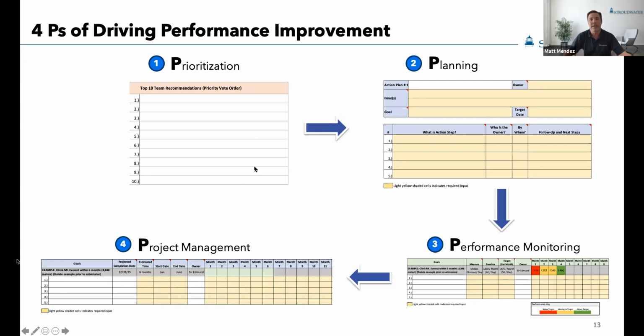And so they need to support and be aligned well with the organization's overarching desire and direction. The second phase is around planning. So we take each of your priorities and we break them down into manageable pieces where we really distill down who owns this particular priority objective, what is the measurable and time phase goal, and then what are the specific tactical steps towards achieving that particular initiative.